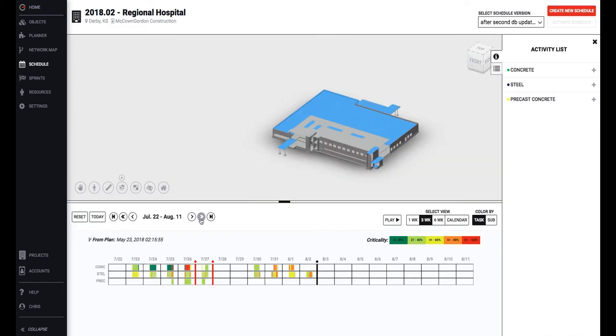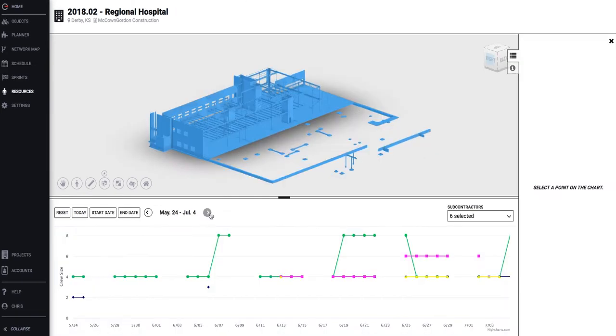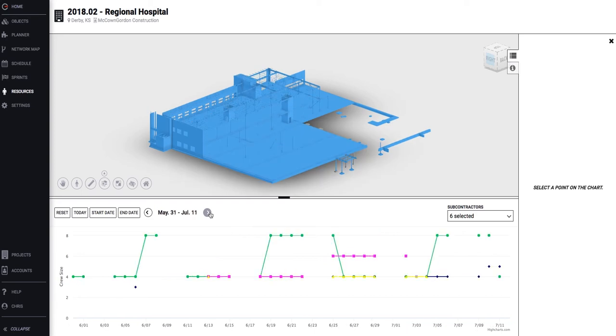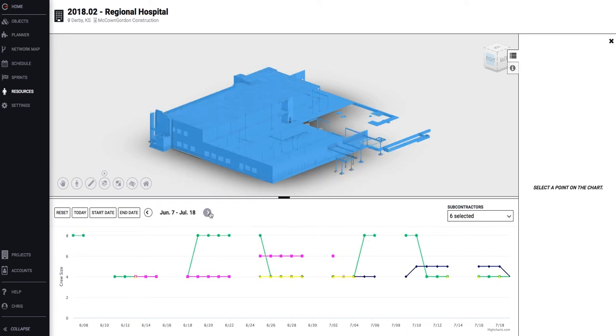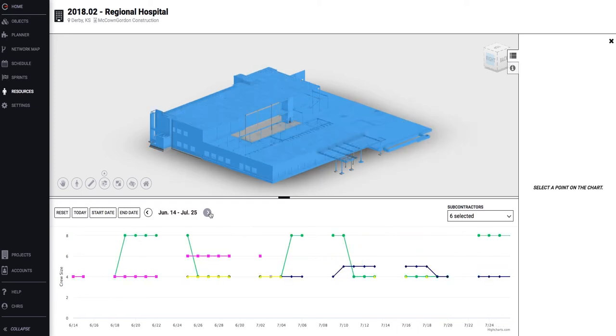Finally, we make it back to the milestones, where the scheduling algorithms will look for the last activity that makes up a milestone, show it here with a diamond indicator, and reference back to the baseline, color coding it whether it's ahead or behind, and then providing some information in a tooltip when you hover over it. So it's great that we have a schedule that's very granular, but we can also derive some more information from it, which has created our new resources page.